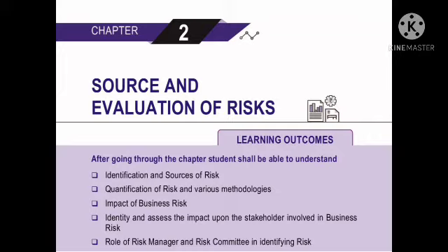Hence, it can be seen that a risk with a value of 9, where the probability and impact rate the highest, requires immediate attention, grid 3. Those with a low rating of 1 or 2 require the least attention and may even be ignored, if insignificant, grid 7. Copyright the Institute of Chartered Accountants of India.